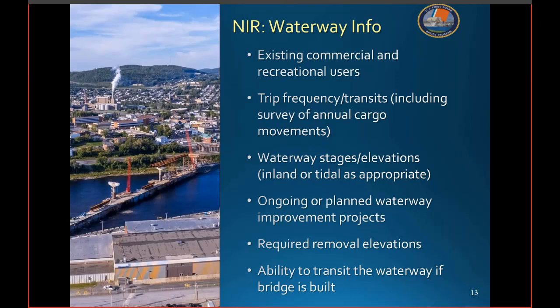If the project is over a federally maintained waterway, the Corps of Engineers will have information and projections on such waterway improvement projects. For non-federally maintained waterways, the applicant should contact cities, councils, local governments, and private facility owners. As a permitting agency for waterway projects, the Army Corps may be aware of some of these non-federal projects.